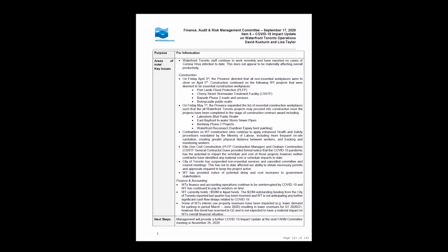With respect to the impacts to date, I would note that while we have been made aware of about $600,000 in costs or claims, we and Elliston at this point don't believe the contractors have provided any reasonable justification for their claims, and unless and until they do, we will continue to essentially reject them. So I just wanted to make those two points.